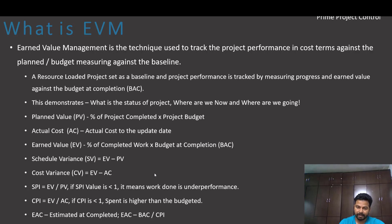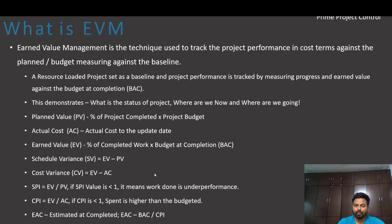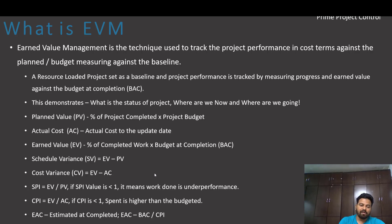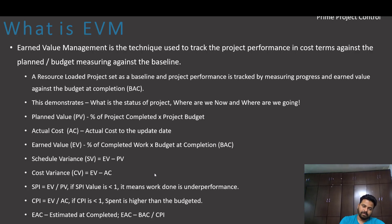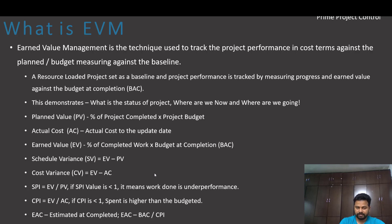What is budget at completion? It is the total cost required to complete the project planned initially. So this whole analysis demonstrates the status of the project timely by measuring where we are now and where we are going. Some of the terminologies we need to know are Planned Value, which is percent of project completed into the project budget, and Actual Cost is the actual cost up to the update date.